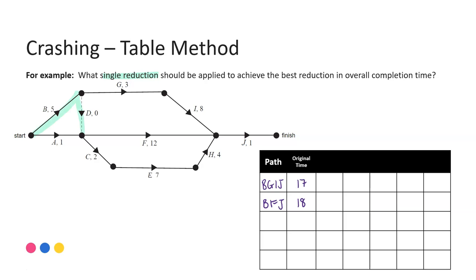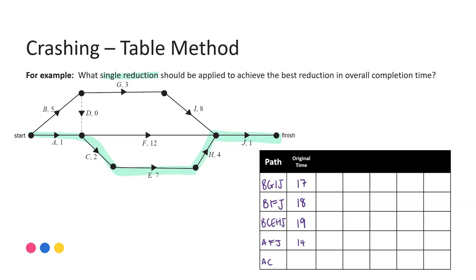Next, going B, dummy, C, E, H, J — the length of that path is 19. Then A, F, J at 14. And finally A, C, E, H, J at 15. So the current critical path is 19, running through B, the dummy edge, C, E, H, and J. Those are the values I should be concentrating on in order to find possible reductions.